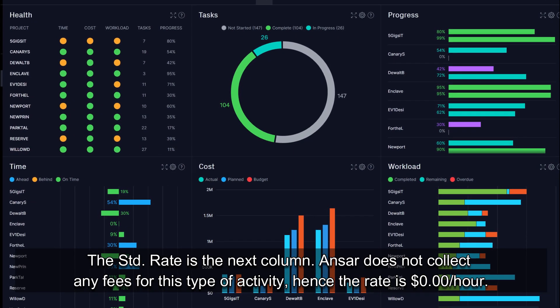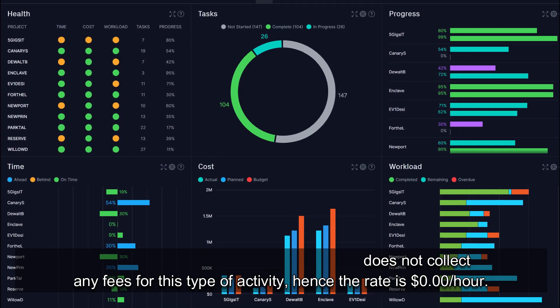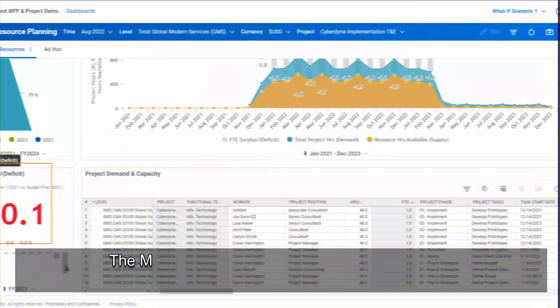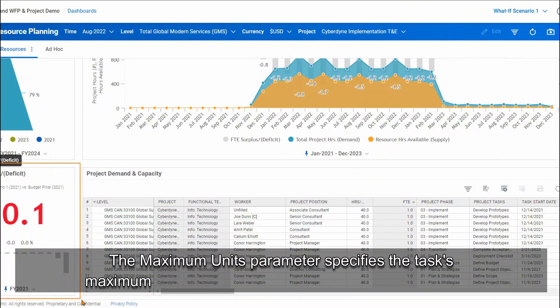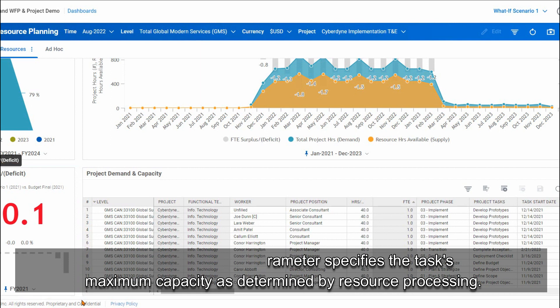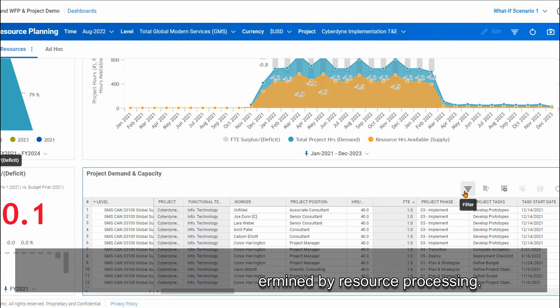Ansar does not collect any fees for this type of activity, hence the rate is zero dollars per hour. The maximum units parameter specifies the task's maximum capacity as determined by resource processing.